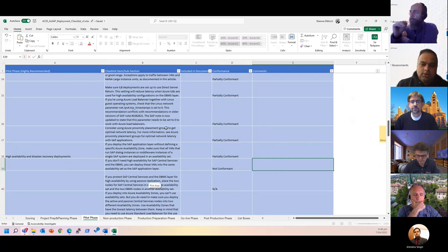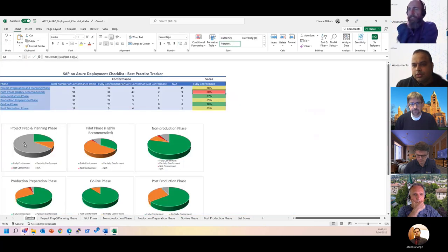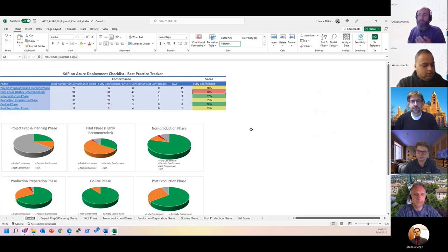What we found with some of our pilot customers is that this feeds into the overall program risk log, where the project managers will come on a regular basis and see how we're tracking. And if we see a lot of red, they want to understand why. So I hope it's clear, from the 2 or 3 minutes I just talked about this, that something very simple, born out of a spreadsheet, can easily give you a quick at-a-glance view of where you've got some hotspots in your project.